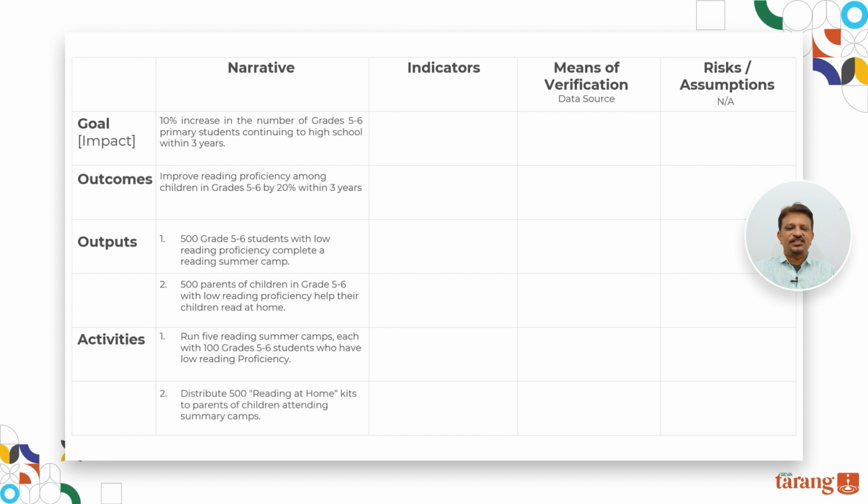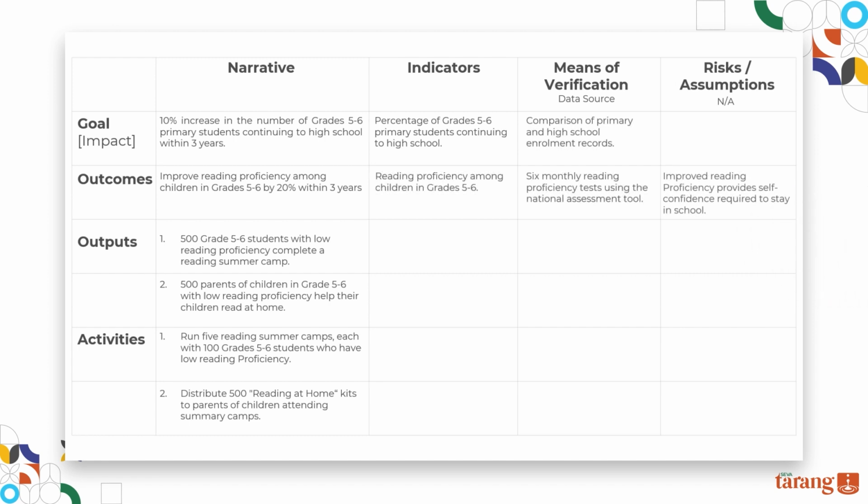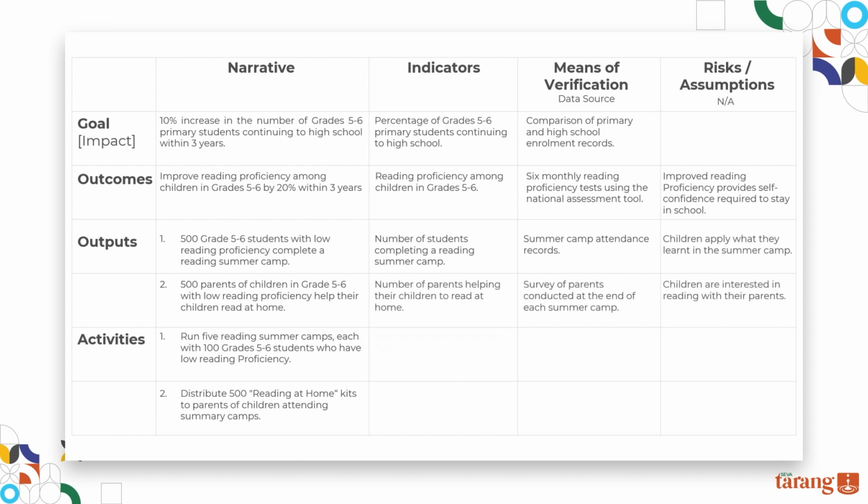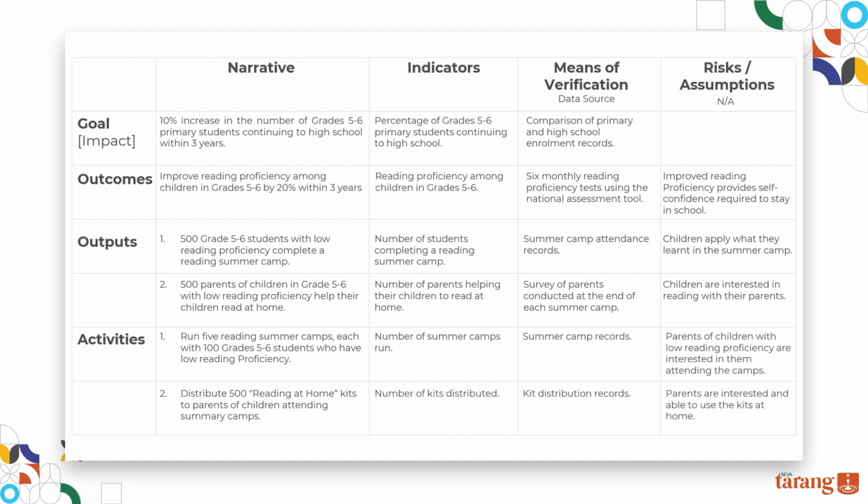The project design is completed by filling in all the fields of the table, including assumptions, along with looking convincing and promising. This presentation is easy to understand and explain, as any stakeholder can find an answer to any of his or her concerns in this framework. As you can see, there are risks and assumptions at all the stages, and only if those assumptions are fulfilled can that project progress as planned.